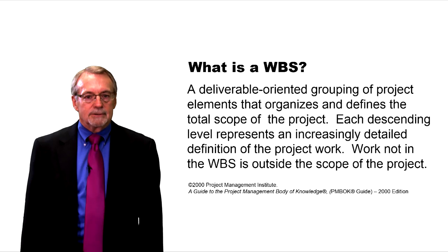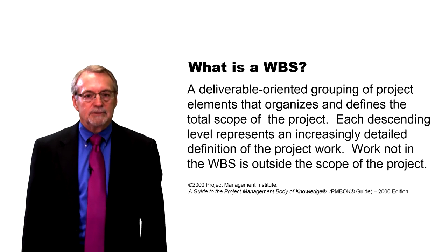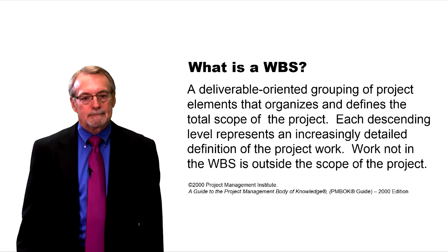Another school of thought, the detailed tasks are on the WBS. Starts with the deliverables, goes all the way down through descending layers and levels of detail until we get to a very fine level of detail called a task, a detailed project task.